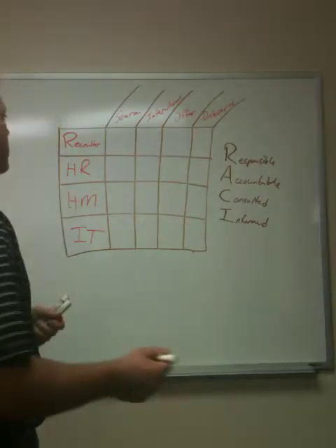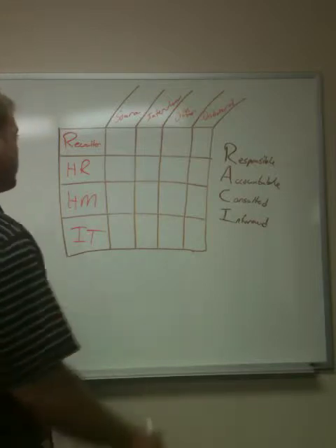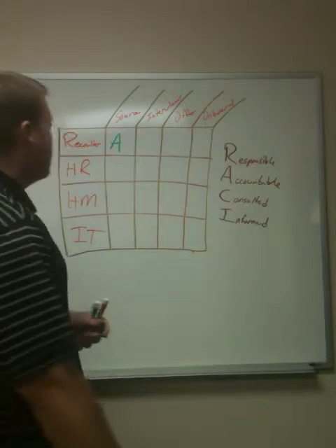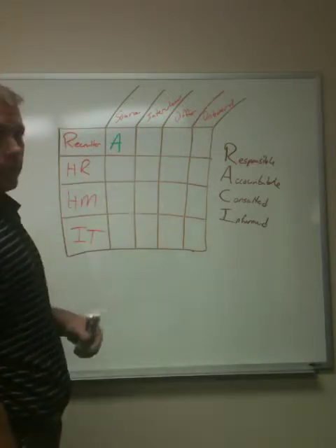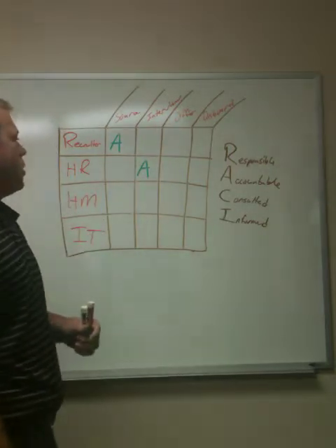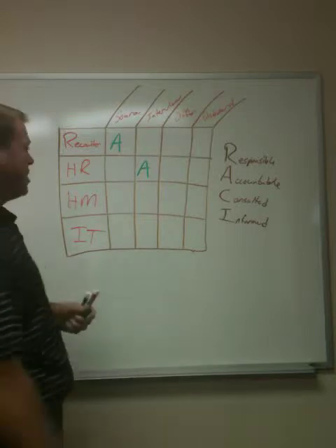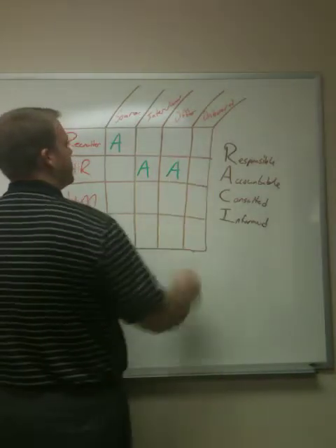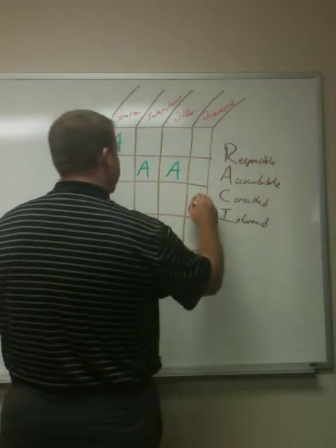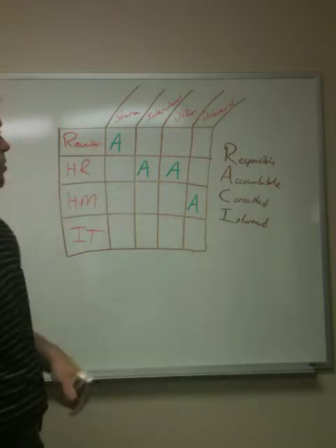So, let's talk about sourcing. That one's a pretty easy one, right? We know who is accountable for the sourcing piece. That's our recruiter, right? Who's accountable for the interviewing? In some organizations, that might be HR. Who's responsible and accountable for the offer? Let's say that's HR again, is accountable. And onboarding, the hiring manager. That's pretty easy. Allows us to see the handoffs, see how it flows from person to person.